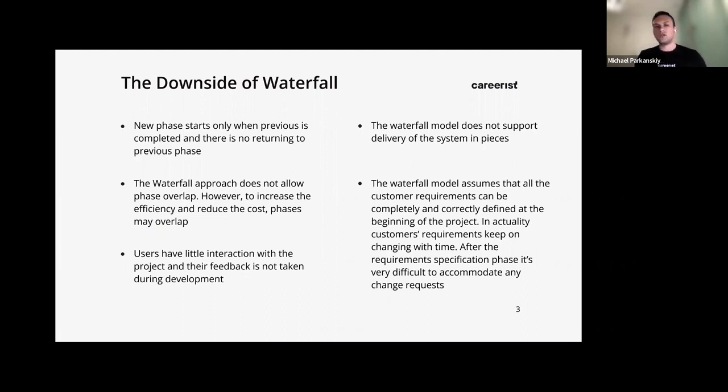So yeah, the problem with waterfall is that sometimes it could take a long time for each of the stages to be finished. Say you put together a requirement and it has to be approved by the government. You send that over to them, and the stage could take a month, could take 2 months, and you can't start building anything. You can't put any designs in, because you never got an official approval from the government agency, or maybe it's a hospital that you're building it for. You might have the requirements figured out, great, completely amazing, but you never got an approval.